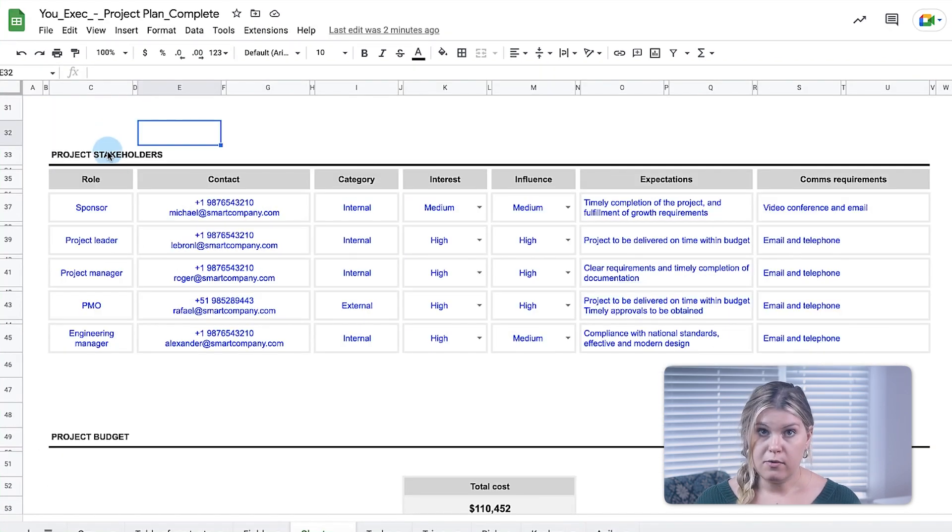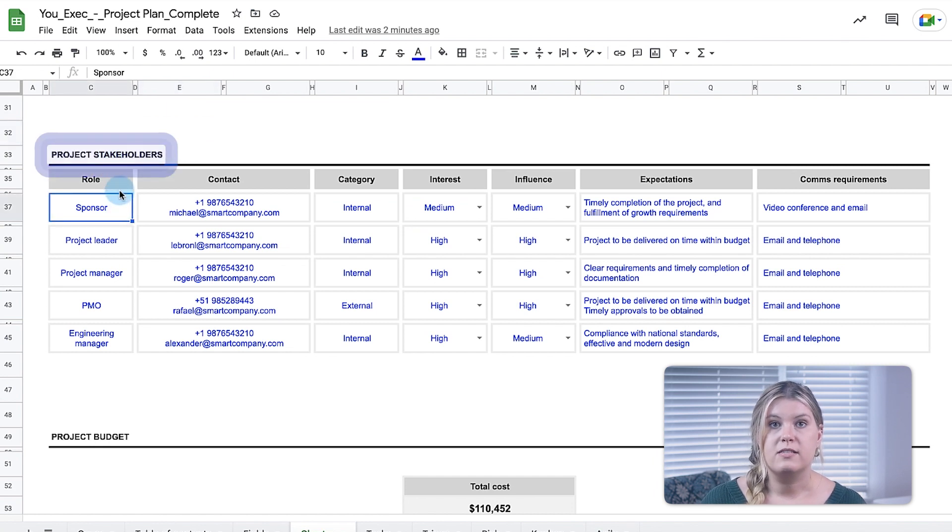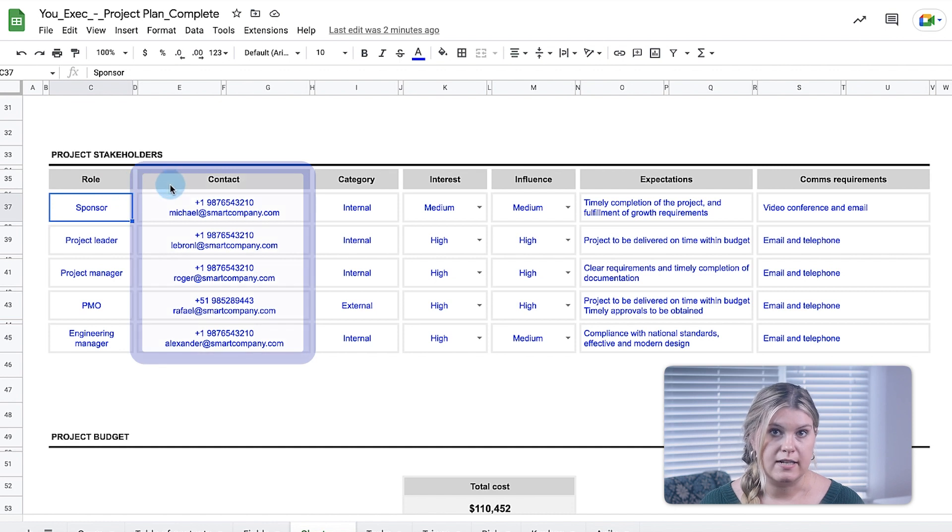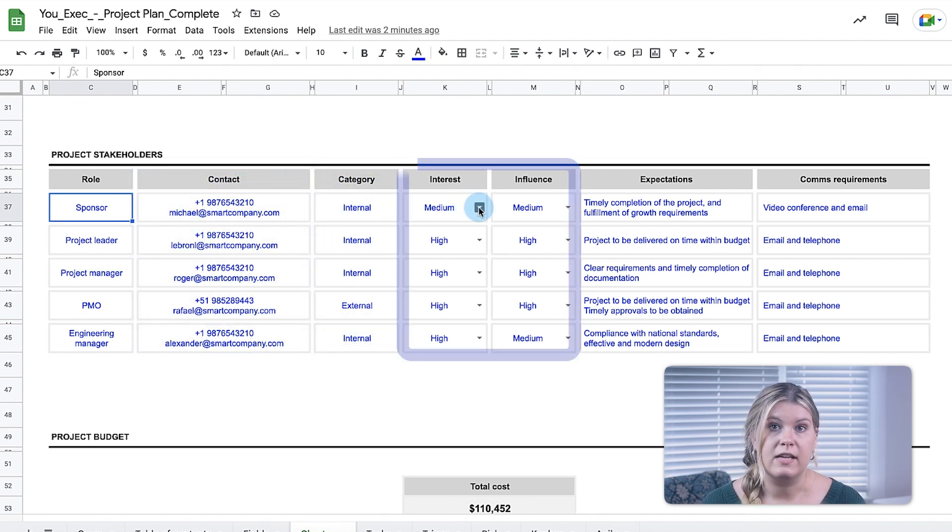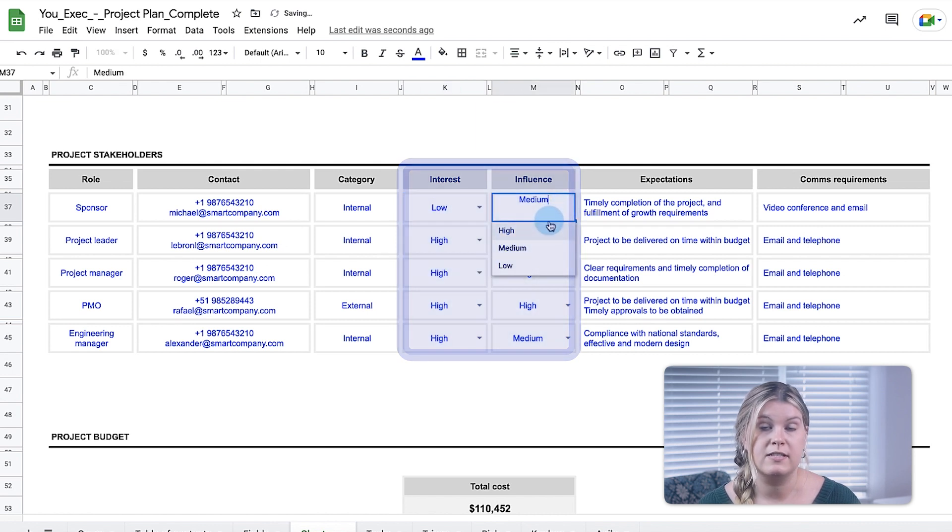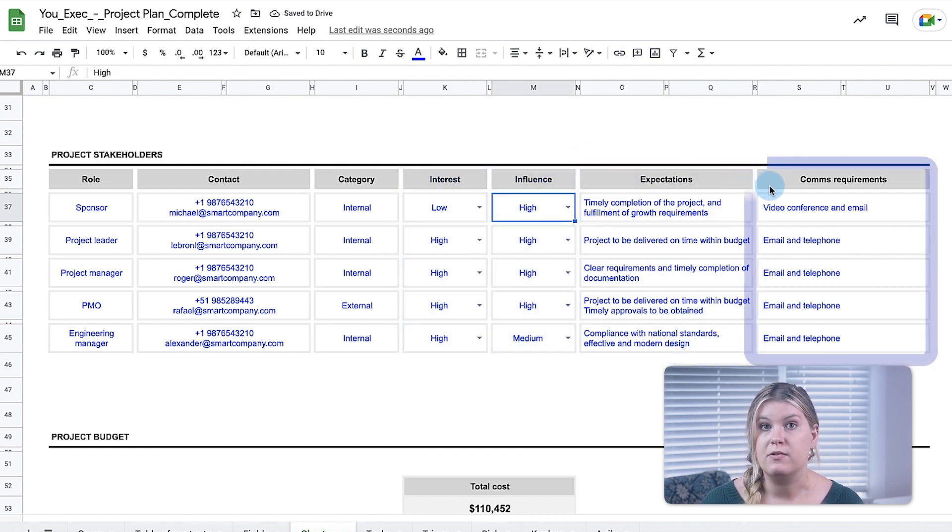Below the Project Charter, the project's stakeholder register lists all the relevant roles, their contact information, whether they're internal or external, their level of interest and influence in the project, and any specific expectations or communication requirements.